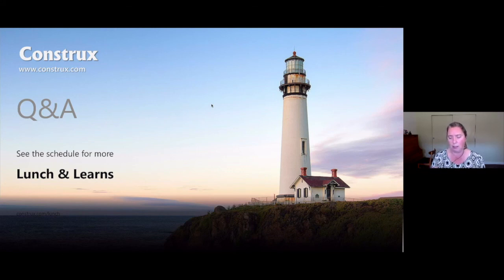Because Eric, I'm sure you've seen this. A lot of times people will say yes, we know, yes, we know, until they reach a point where that architecture or technical debt has become really big and is going to be really painful to start paying off. So I try to find early warning signs or early pain points that I can expose to other people, often folks like product managers, so we can start to incrementally pay that off as we go. I've never found a place where people suddenly agree, yeah, you've got a 6 month release and all you're going to do is re-architecture work. But if I can do 20% rather than waiting another year and a half and all of a sudden I'm spending 50%, if I can get that exposure and get people talking about it sooner, that's always better.